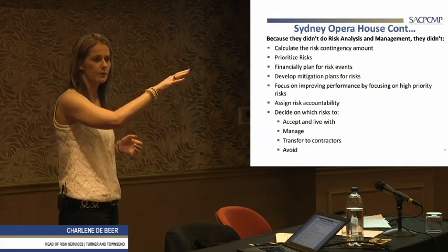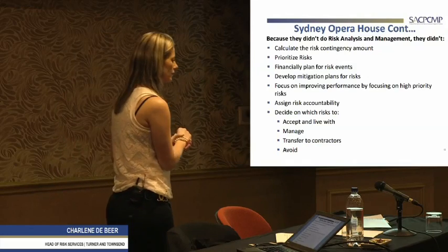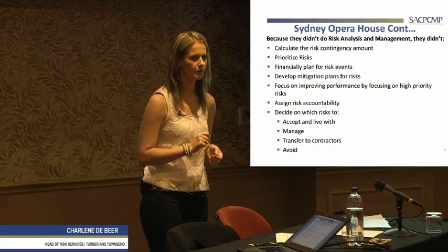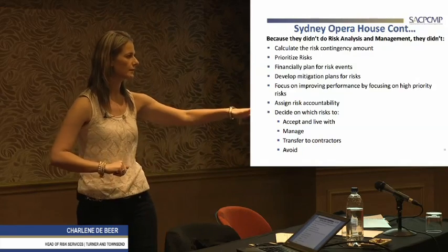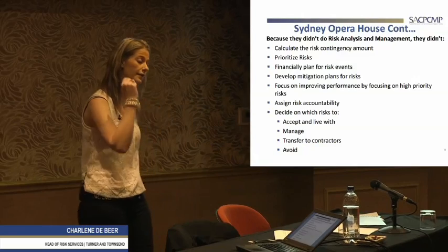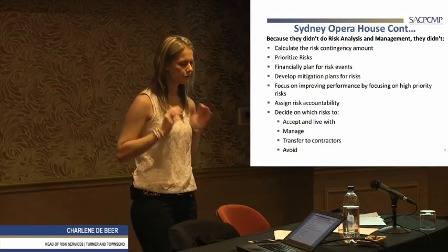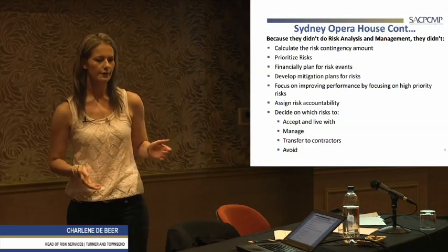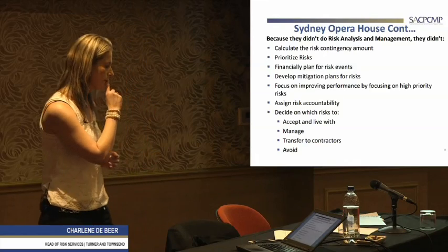So we placed the order in Italy. It actually, believe it or not, took 40 weeks, ex-works, just to get it here. That was without placing the order, going through the whole commercial 3-quote assessment, placing the order, and then actually installing them on site. It took them 40 weeks to fabricate those valves and ship them into South Africa.